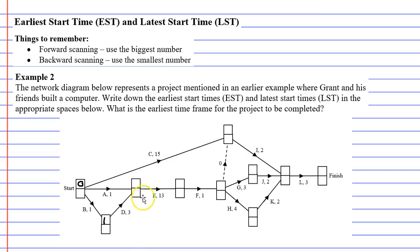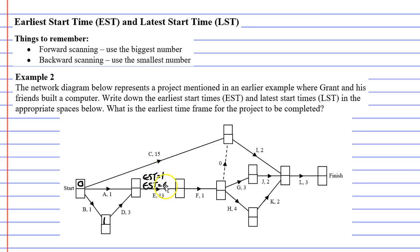Then we get to our next vertex. There are two different paths we can take to get here: we can take the path along activity A, or the path along activities B then D. If we go along activity A, it's only one minute — zero plus one is one. Or if we go along activities B then D, we get one plus three, which comes out to four minutes. We always pick the bigger number, so we're going to write down four.